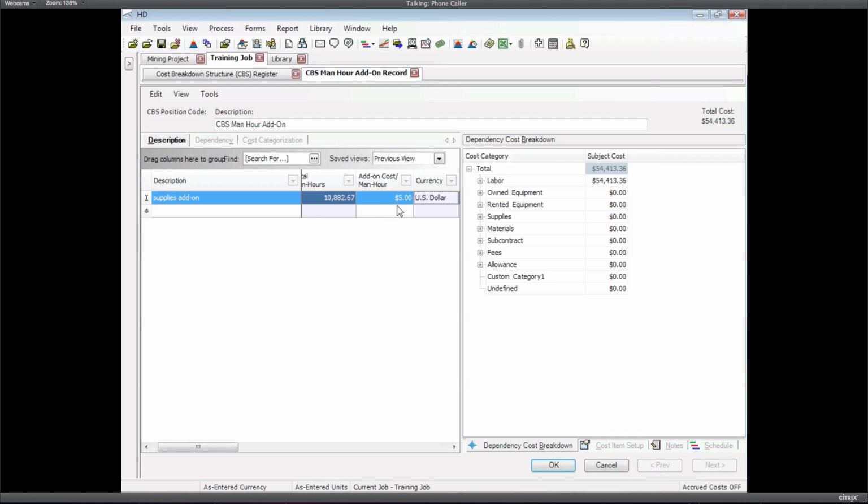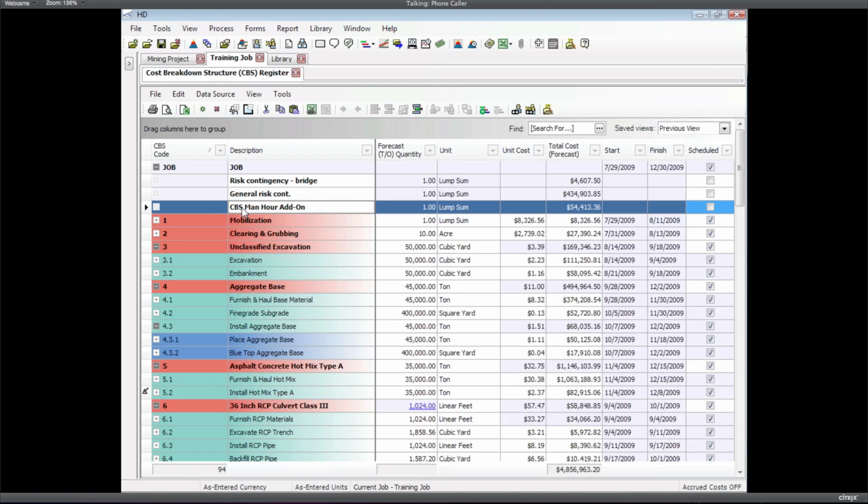And can you drag those, after you're done, drag it down underneath the... We saw earlier how you repositioned those dependent cost items at the top of the CBS. Is it possible to move those down lower into the CBS? They do have to be at the top, for the same reason that we can't mix them with the predefined items, and again, that's just to avoid the circular calculations.